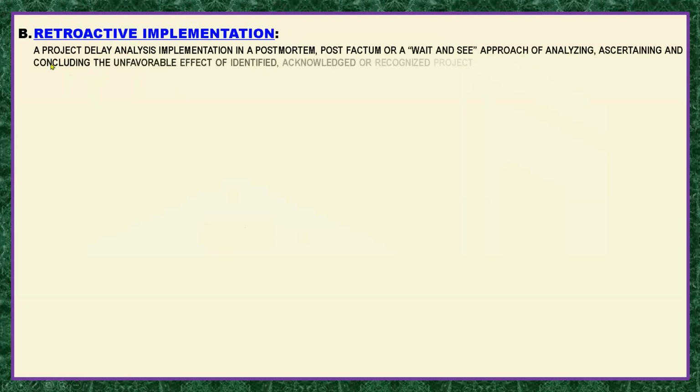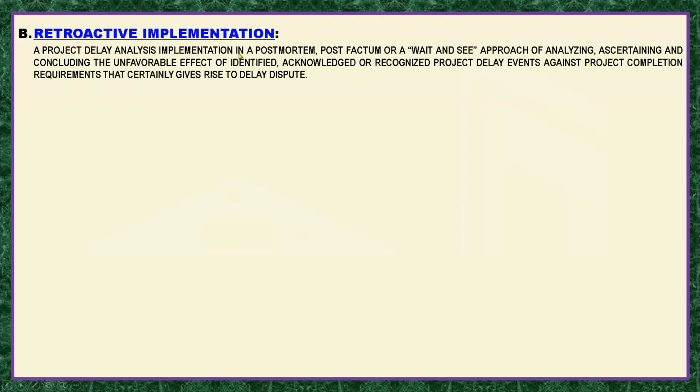Okay, we have here the retroactive implementation, as I said. So retroactive implementation is a project delay analysis implementation in a post-mortem, post-factum, or wait-and-see approach of analyzing, ascertaining, and concluding the unfavorable effect of identified, acknowledged, or recognized project delay events against project completion requirements that certainly gives rise to delay dispute.